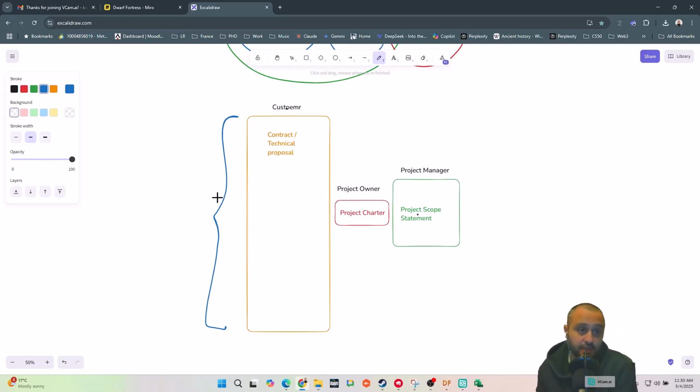It happened a lot, but you need to understand that if you are a project manager, first of all, it's not your responsibility. If the company pushes you to provide the project charter, it's fine, you can write it, but the project owner, the person who is going to give you the project, is responsible to sign and approve it. That's very important.